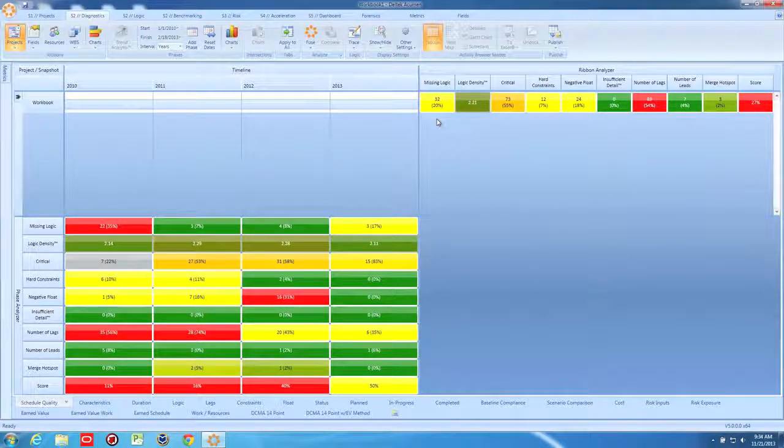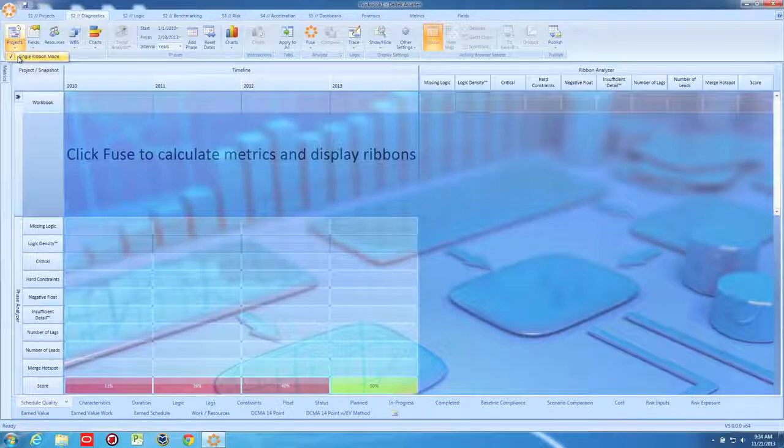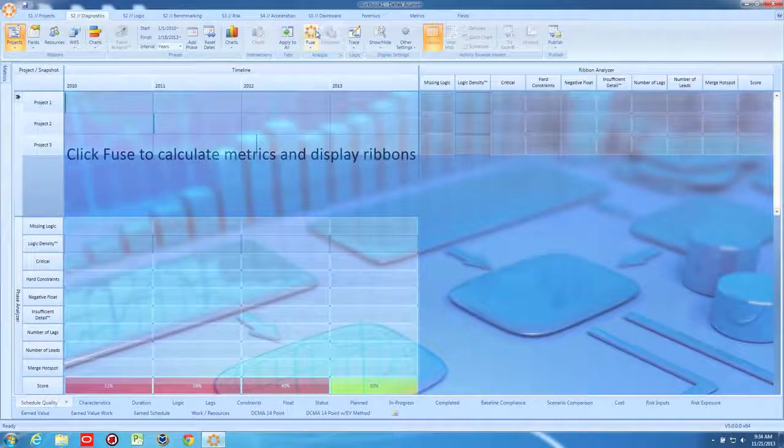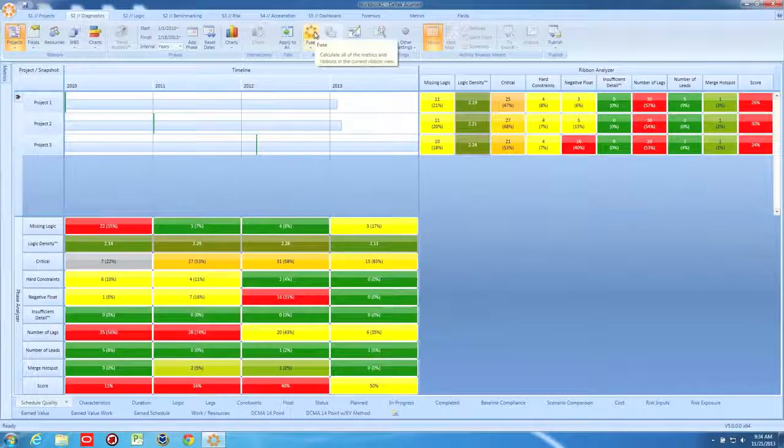If we're removing certain types of logic and replacing it with other areas, well, what happens to the tasks that we've removed the logic from? They potentially run the risk of having increased missing logic. So I can't rob Peter to pay Paul. So although most of the time I'm going to drill down and not be in single ribbon mode, single ribbon mode is my reminder that that's what quality is all about.